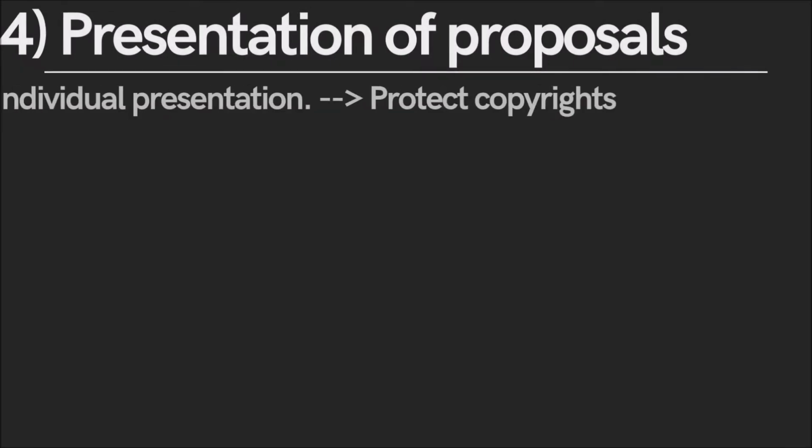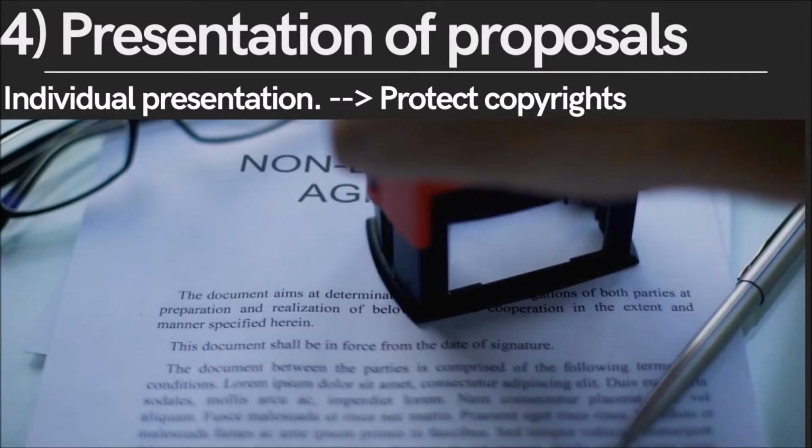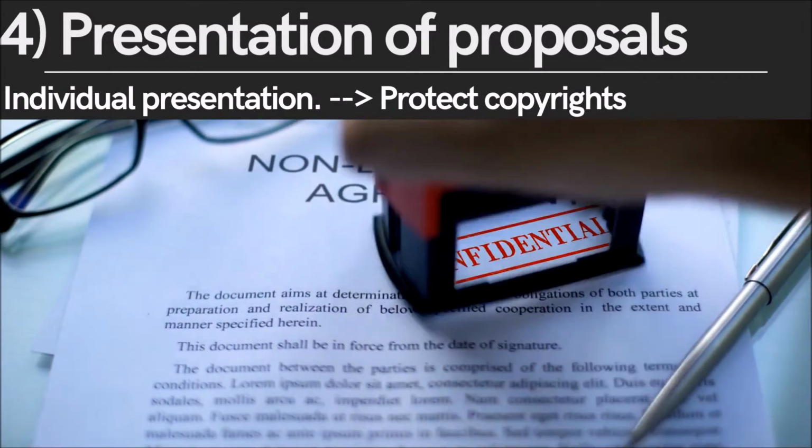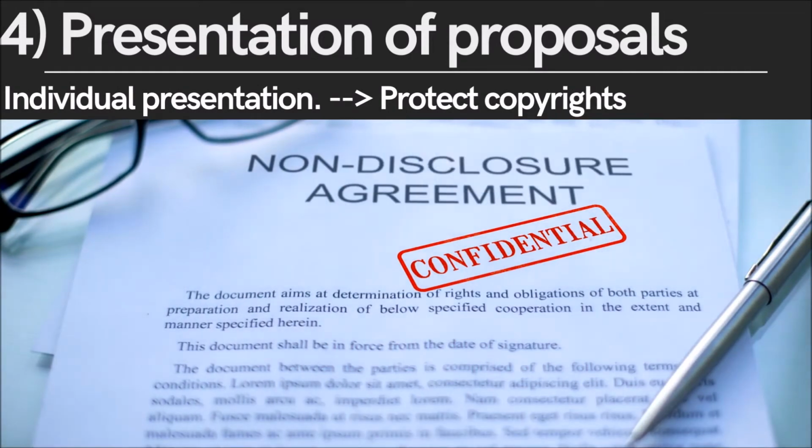The presentation of the proposal has to be separate, supplier by supplier. You need to protect the supplier data. It is not possible to share the solution from one supplier with another because you have to respect the copyrights. Also, you cannot share any detail about the cost or the way of working from one vendor to another.